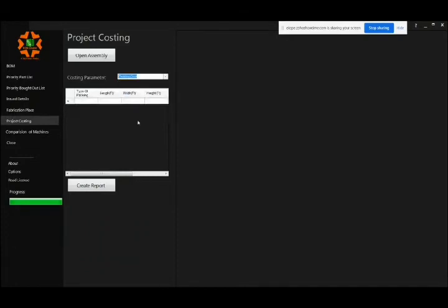Go and add. Next, interesting is the packing. Normally our domestic orders are done with roadworthy packing, and our export orders are done as seaworthy packing, right? So I can just add, say, I do a roadworthy packing, and say my packing box size is 50 feet by 100 feet by 200 feet high, and I need two boxes. And what is the cost per cubic feet? Roadworthy packing ranges from 22 rupees per cubic feet to 30 rupees per cubic feet. Again, it depends on industry standards. So let's say I take 25 rupees per cubic feet.